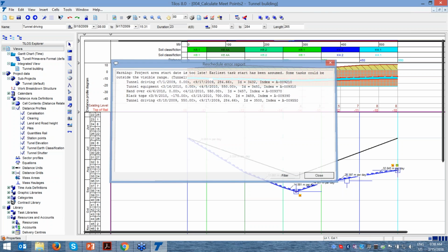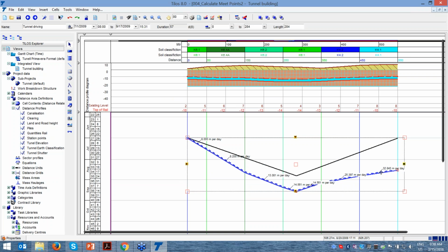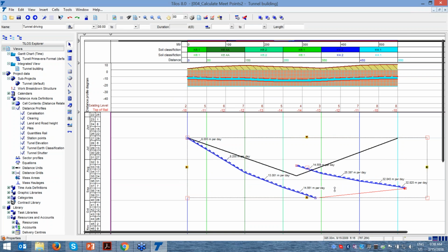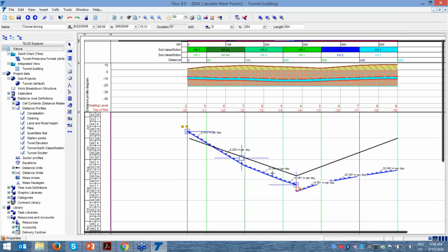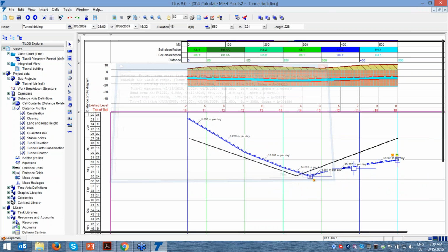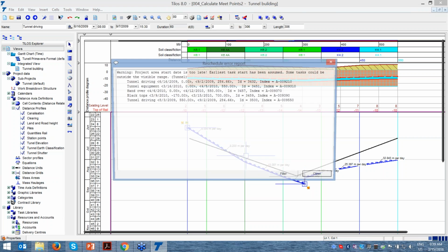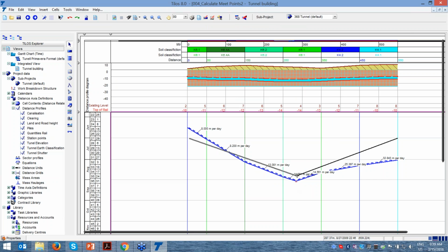We want our 2 TBMs to meet at 275 meters. Exactly what I wanted. But one thing is missing here: time. So if I want them to meet there, but also earlier, I can just tell, okay, let's start this a little bit early, and this one a little bit later. And by trying manually, I can find the time also here.